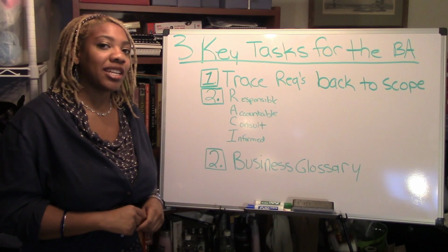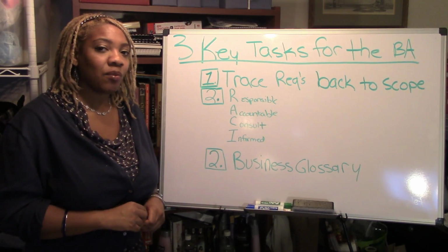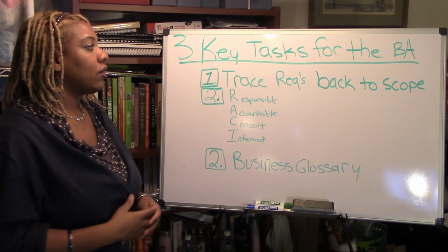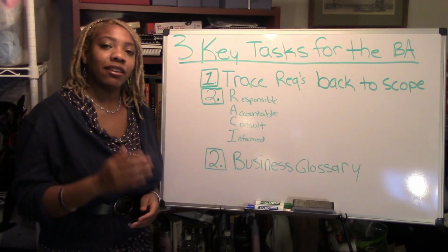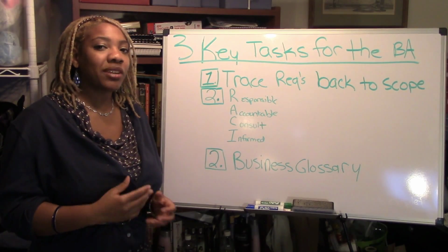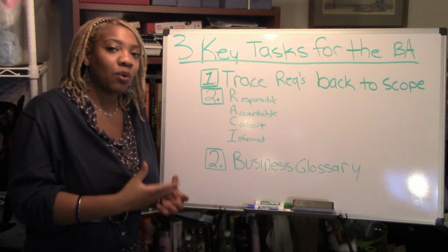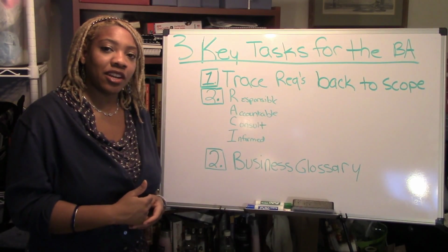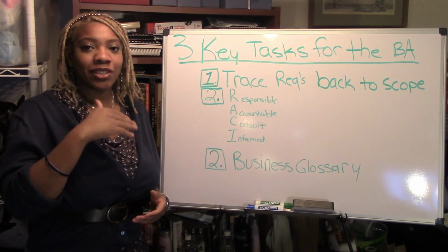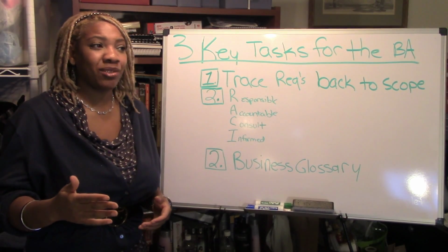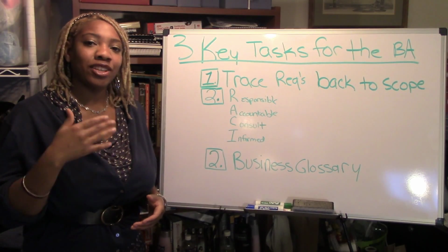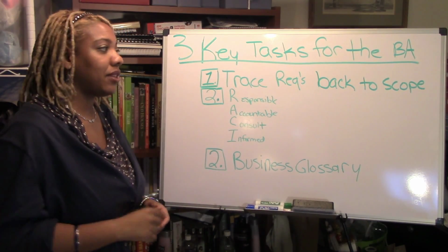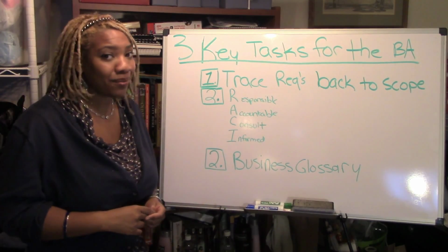And if it's not, you really need to get clarification, but err on the side of caution when you get that scope. So if you go back and look at all the requirements you gathered, it's pretty easy to see if it supports the scope or not. But if you don't do the analysis and you include it in all your documentation, waiting until the nth hour to go, well, this wasn't even included, that doesn't really work. So your daily analysis of all the requirements, you need to do this every single time, okay? Or else it's not going to end well for anybody.